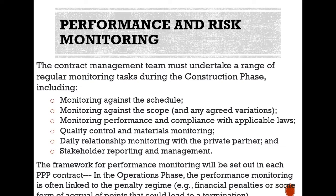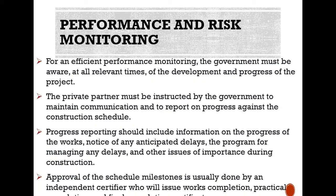The framework for performance monitoring will be set out in each PPP contract. In the operations phase, performance monitoring is often linked to the penalty regime — for example, financial penalties or some form of accrual of points that could lead to termination. For efficient performance monitoring, the government must be aware at all relevant times of the development and progress of the project. The private partner must be instructed to maintain communication and report on progress against the construction schedule. Progress reporting should include information on the progress of works, notice of any anticipated delays, the program for managing any delays, and other issues of importance during construction.